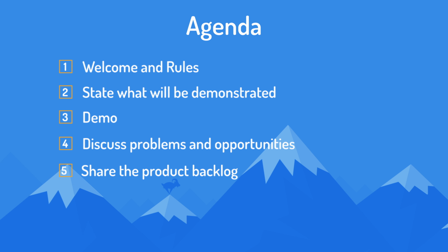Next, a product owner should share which items are currently at the top of the product backlog. Unless things change, these will be the items the team works on next. If anything stakeholders saw during the review affects priorities, this is stakeholders' chance to convince the product owner to make a change. Or if the team got more or less done than anticipated, this is the time to discuss changing plans for an upcoming release.